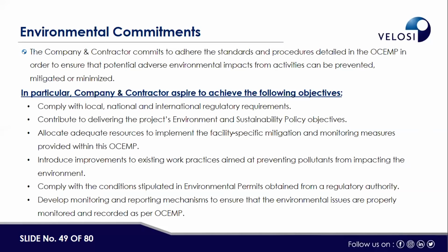In that perspective, if we develop the OEMP, then it will cover only the operation phase, or only the operation activity of that particular project, and it should be audited. It depends on us how we define the frequency for the audit in the EMP. It can be on a quarterly basis, a biannual basis, or an annual basis. But at minimum, on an annual basis, it should be audited for how effective the EMP is, and for the conditions that I mentioned in the previous slide, on those 4 conditions, the OEMP will also need to be updated.